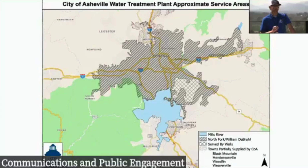So we are having to restore a water system and roads and do the design work. The engineering is actually happening in the field as the work occurs. Normally, you would have the engineers in the office. They would do the design work. Then we would do a bid and do the construction. So all this is happening at once. The contractors have their engineers. We have ours. We are engineering and building concurrently to restore the distribution system.